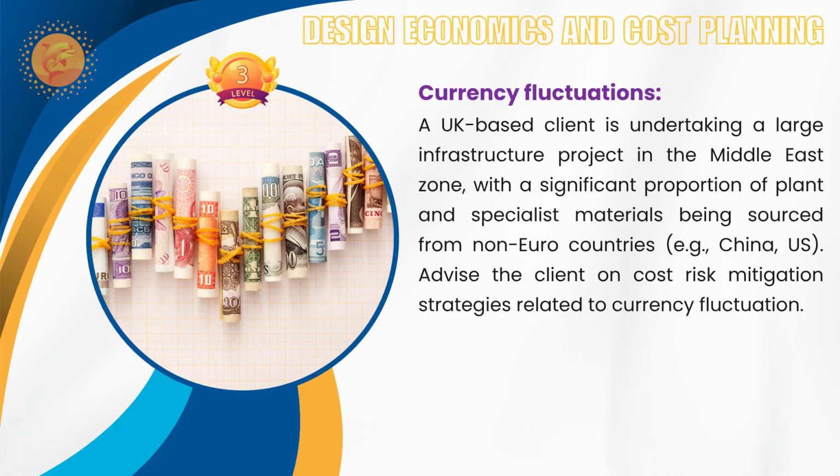Primarily, it is the risk identification. You have to identify the currency exposure. You are getting into either euro or sterling pound that is converted into AED for the whole of the works. At the same time, you have to pay in USD or Chinese currency. Those kinds of things you may incur. Another exchange value: a strengthening USD against the euro increases the project cost. So this is one scenario. So how would you mitigate?